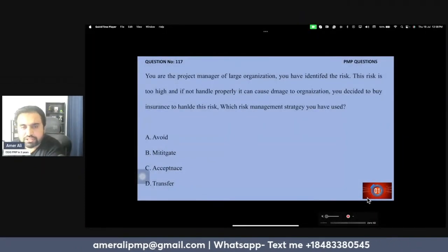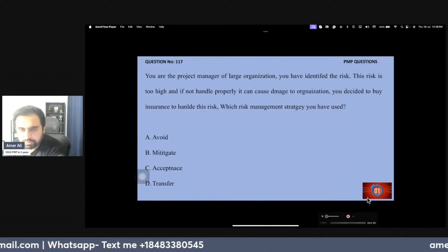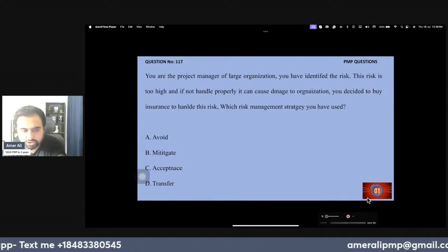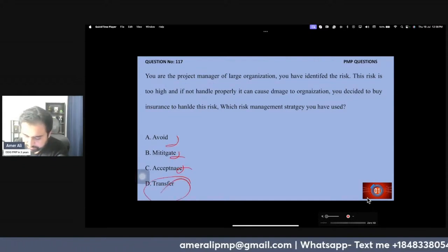You're the project manager. You have identified the risk. The risk is too high. It can cause damage to the organization. You decided to buy insurance. So here insurance is for that. No acceptance. No. It is D.